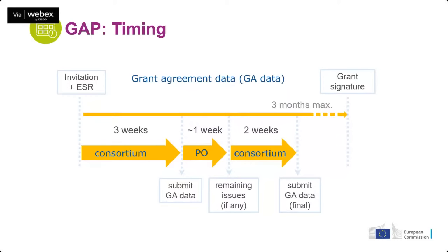For example, if you are doing research with human embryos or stem cells or other things that are subject to ethics clearance, that might require other processes and getting clearance from the member states, and you could have to wait even 1 month more to get this clearance. Therefore, do not plan to use the 3 months limit, and try to be as fast as possible in order to be on the safe side.